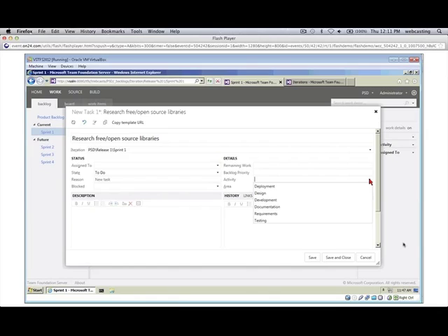Professional Scrum development teams are able to do, any one of those people is able to do any one of these items, albeit sometimes clumsily, but they can pair up with somebody. So if you want to think of an analog example of what I'm talking about, if you ever put stickies on a board, the yellow stickies are programming tasks, the green stickies are testing tasks, red stickies are database tasks, then it conditions people to look for their color, and that's not necessarily what's best for the increment at that point in time.